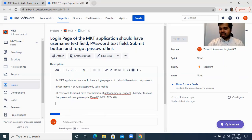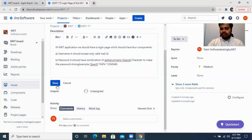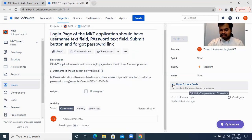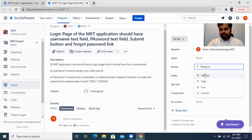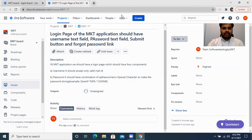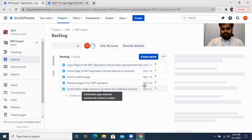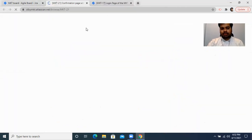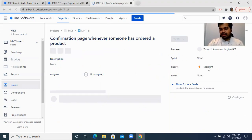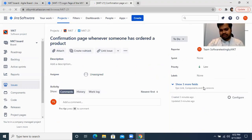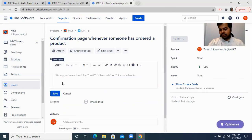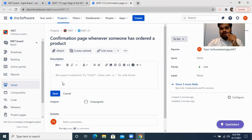Now if you see here, being the product manager, I have a lot of things to do — like setting the priority of a particular task. I can change the priority based on my understanding. Whichever I want to deliver to the customer first, I will mark as highest priority. If I feel the confirmation page is something we need to work on at the last step, then I can change the priority of it to low. And definitely I should add the whole description for each task.